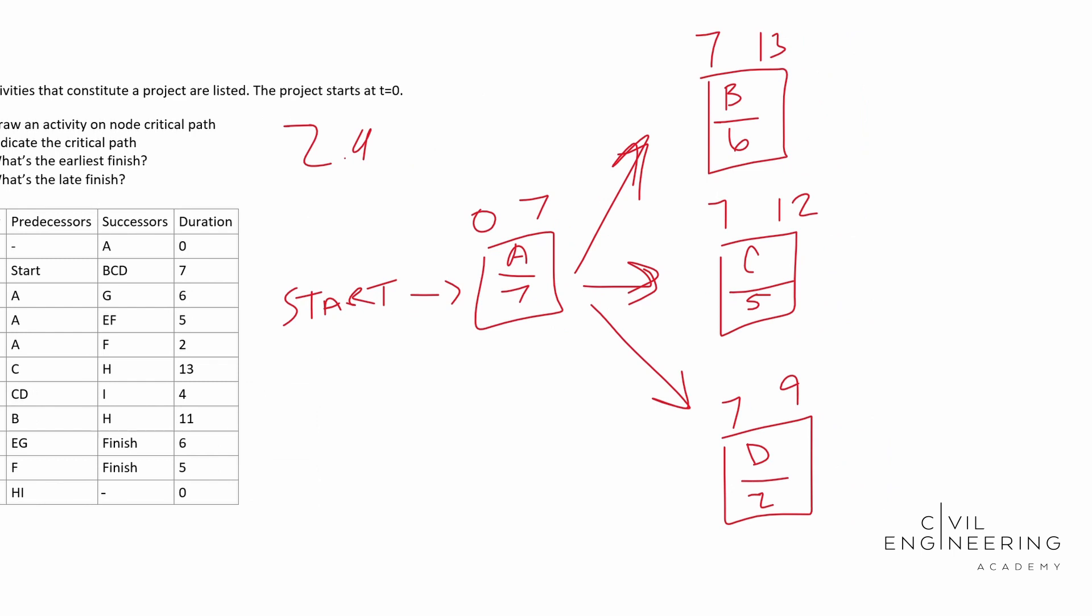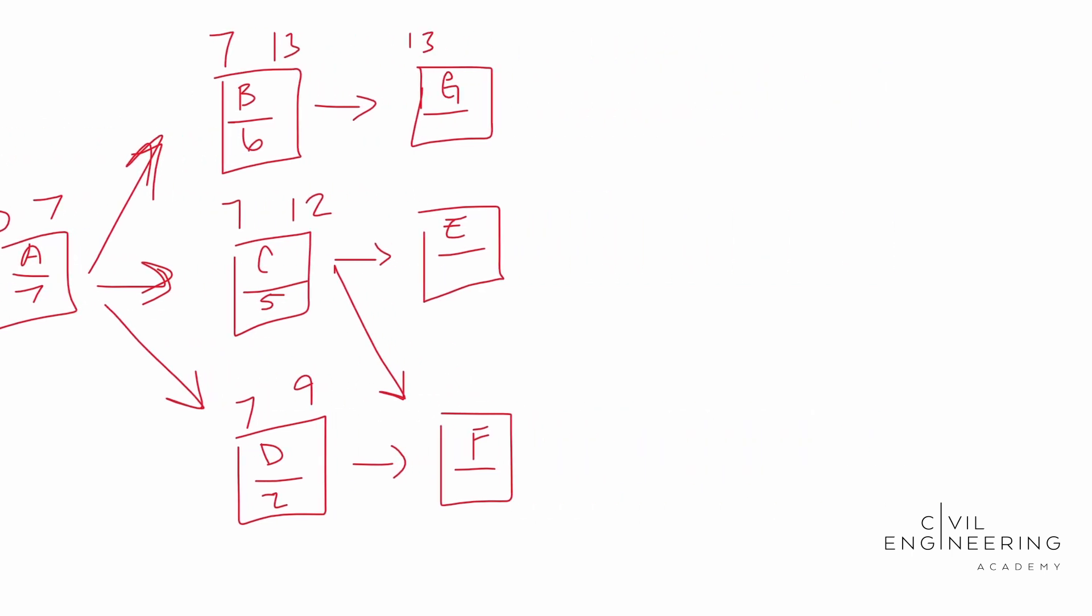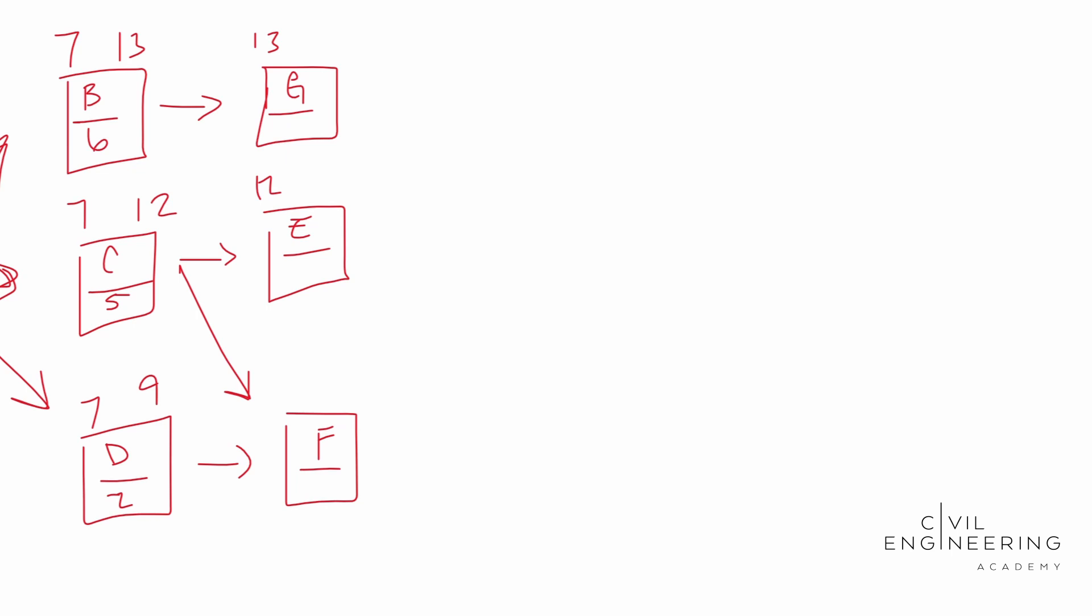So B goes to G. Let's go ahead and draw our G. C goes to E and F and D goes to F. All right. So simple enough. We can draw our arrows. Now this guy goes to that guy and that guy. B goes to G. So the soonest that G can start is on day 13. We're going to go ahead and lose the table here. All right. So the soonest that E can start is on day 12, because it's dependent on when C gets finished. So as far as F goes, it has two contributing factors. It has C and it has D. Its earliest start is going to be on day 12. And the reason why is because F cannot start until D and C are completed. So its earliest start is 12.